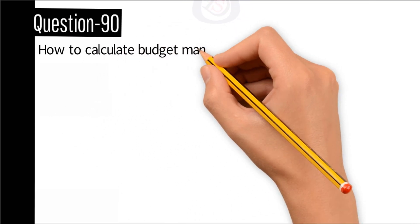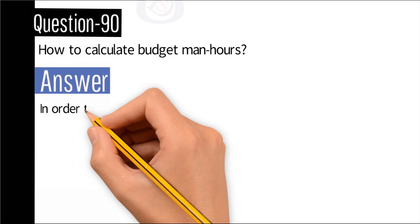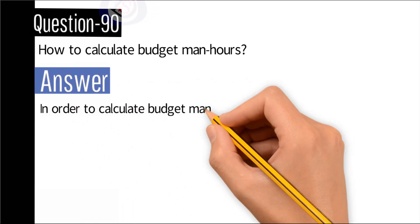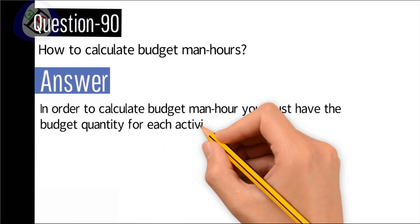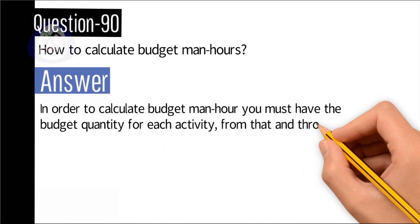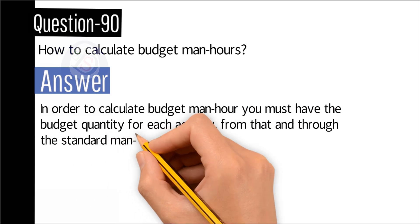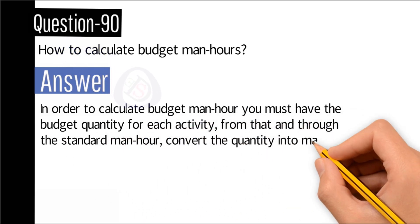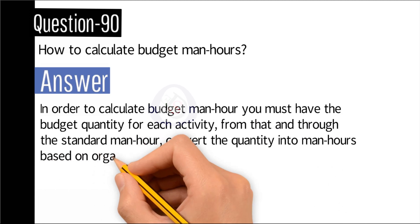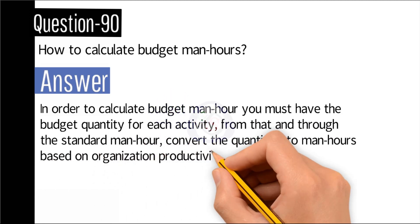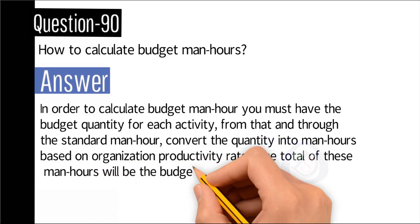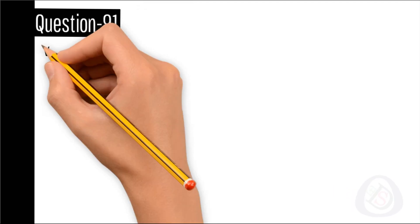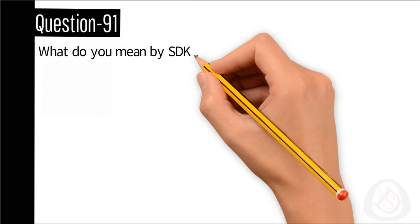Question number 90: How to calculate budget man-hours? Answer: In order to calculate budget man-hours, you must have the budget quantity for each activity. From that, and through the standard man-hour, convert the quantity into man-hours based on organization productivity rates. The total of these man-hours will be the budgeted man-hours.